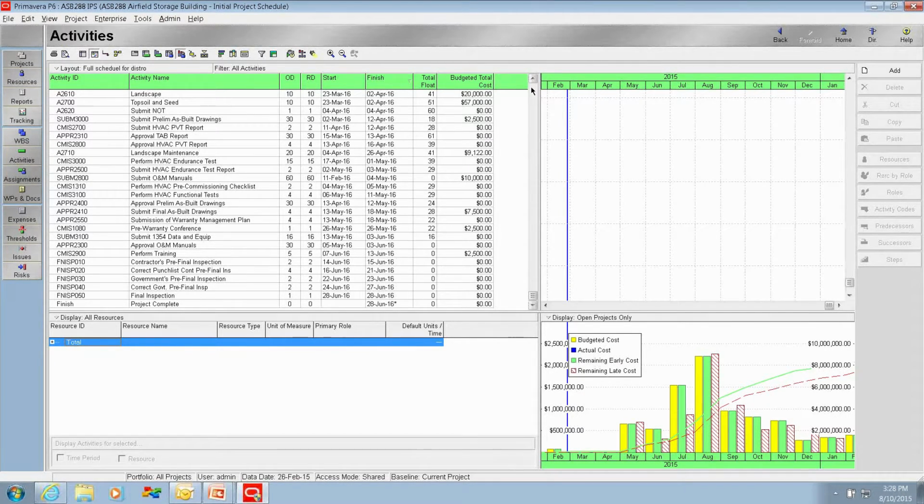Pay attention to your specification sections. There are specification sections that do require a certain amount of money be set aside for your O&M manuals, your as-builts, and so forth. So make sure you're familiar with your contract itself to see if you have that allowance in there.